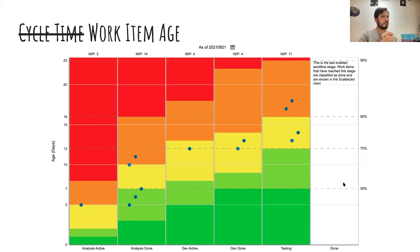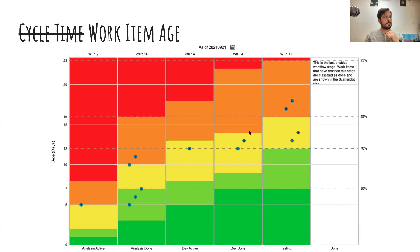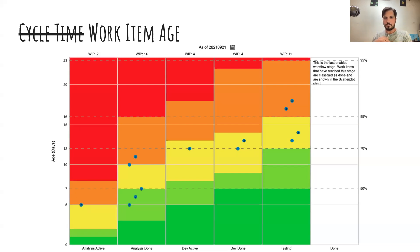Each dot on this chart represents a card or group of cards currently active. The column represents the column on your team's board — where it is on the board — and the height of the dot corresponds to how many days it's been since that work item started. The colors relate to the cycle time scatter plot. The 85% line goes across, and if something breaks that 85% line, it's equivalent to the 85% cycle time on the scatter plot. It steps down as you get to each column — so 85% of work finishes dev done by here, 85% finishes dev active by here.